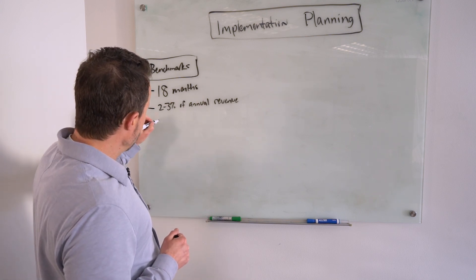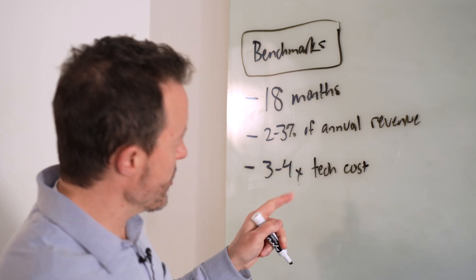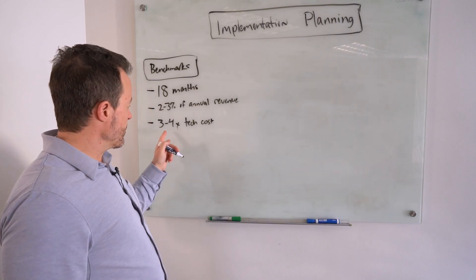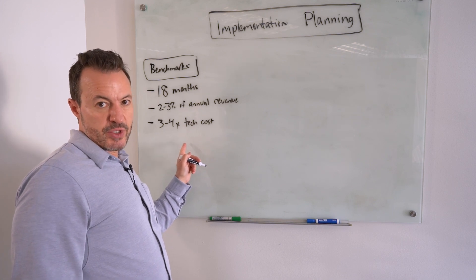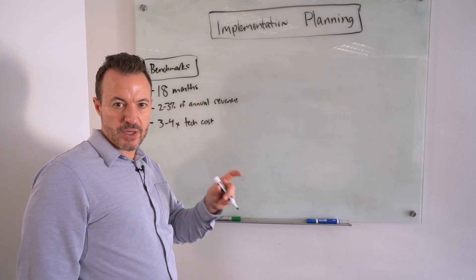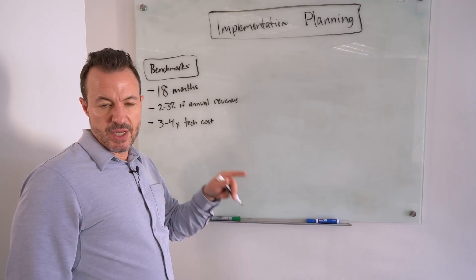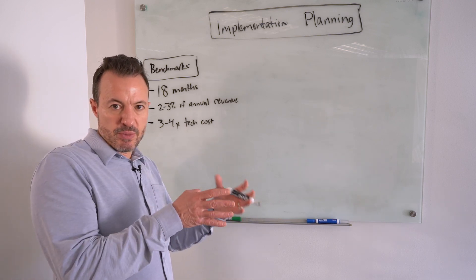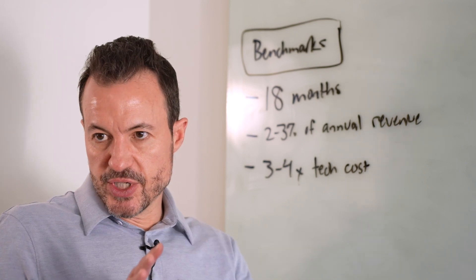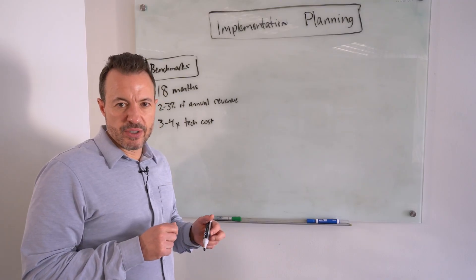Another useful average cost metric is to look at three to four times your technology cost. In other words, whatever you're spending on software — take three to four times that and that's typically your total cost of ownership. Keep in mind, this metric was largely based on the old on-premise model. With most vendors now moving to a subscription model, you may need to translate the subscription cost into an on-premise equivalent and then multiply by three to four times to get your total cost of ownership.